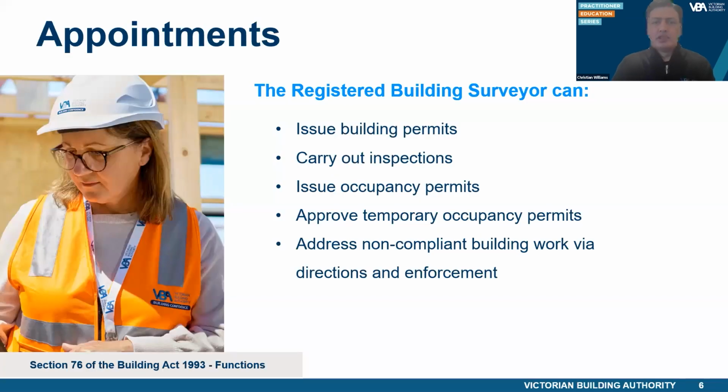The job of a registered building surveyor is to ensure that building work complies with the Act, the regulations, and the National Construction Code. They also issue building permits to allow building work to commence. Building surveyors carry out inspections to ensure building work is being undertaken correctly. They also issue occupancy permits or certificates of final inspection when the work is complete.